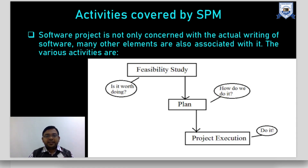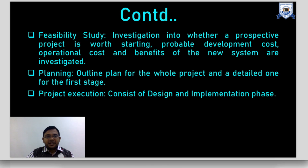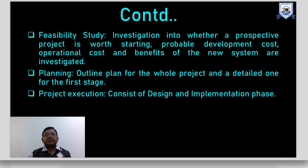Activities covered by SPM at a broad level are feasibility, planning, and project execution. A software project is not only concerned with the actual writing of software — many other elements are associated. Feasibility study investigates whether a prospective project is worth starting, the probable development cost, whether technical resources are available, and the operational costs and benefits of the new system.